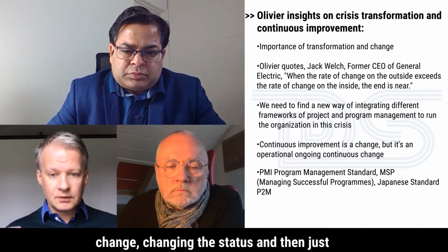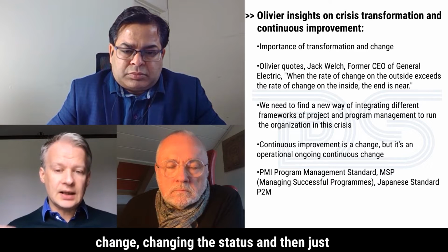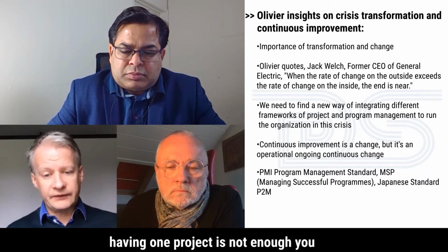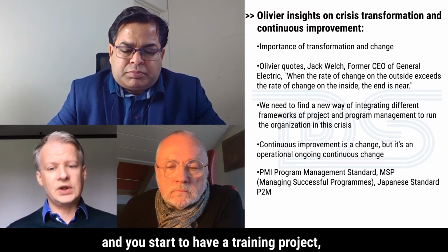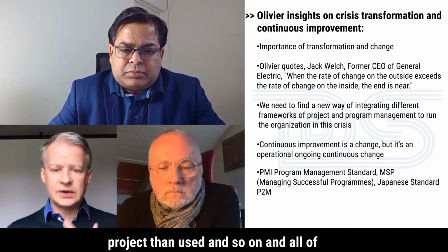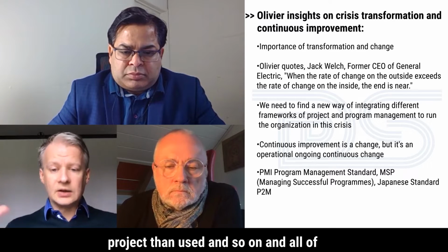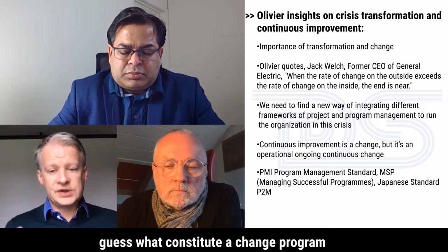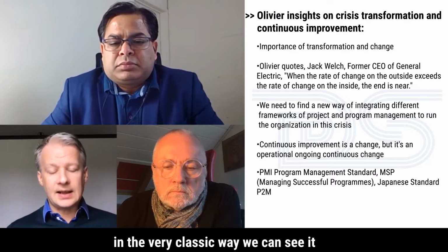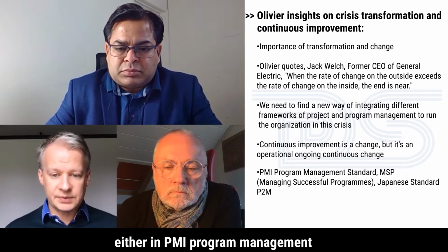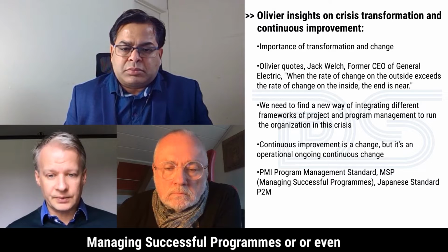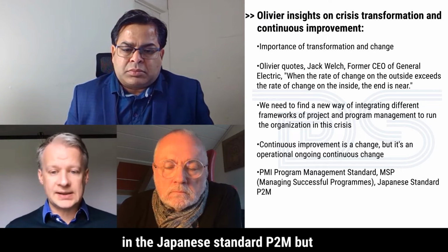That's a change, changing the status. And then just having one project is not enough. You start to have, yes, one IT project, then you start to have a training project, then you start to have a data migration project, and so on. And all of that, guess what? Constitutes a change program. In the very classic way, we can see it either in PMI's program management standard, or we can see it in MSP's Managing Successful Programs, or even in the Japanese standard P2M.